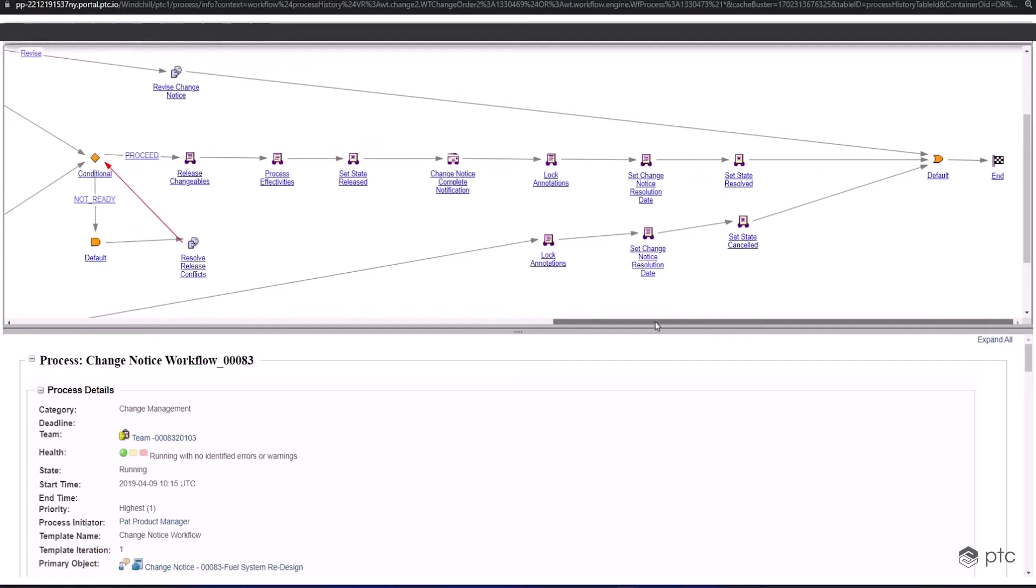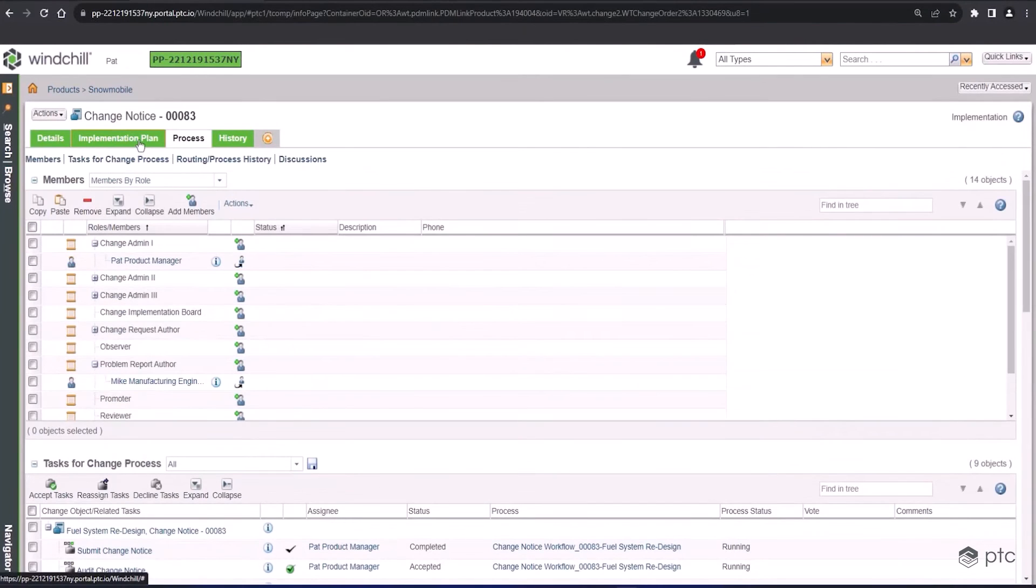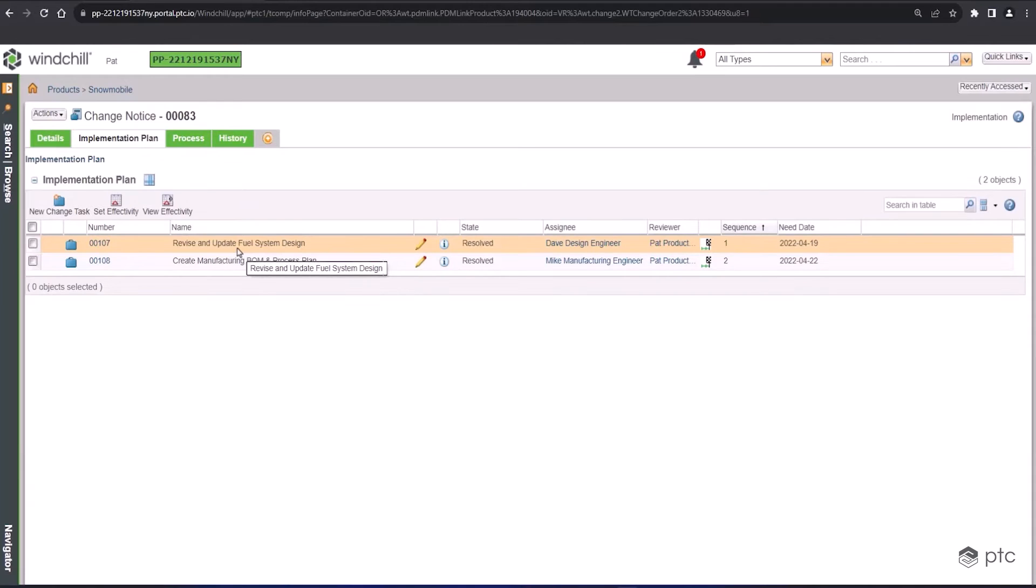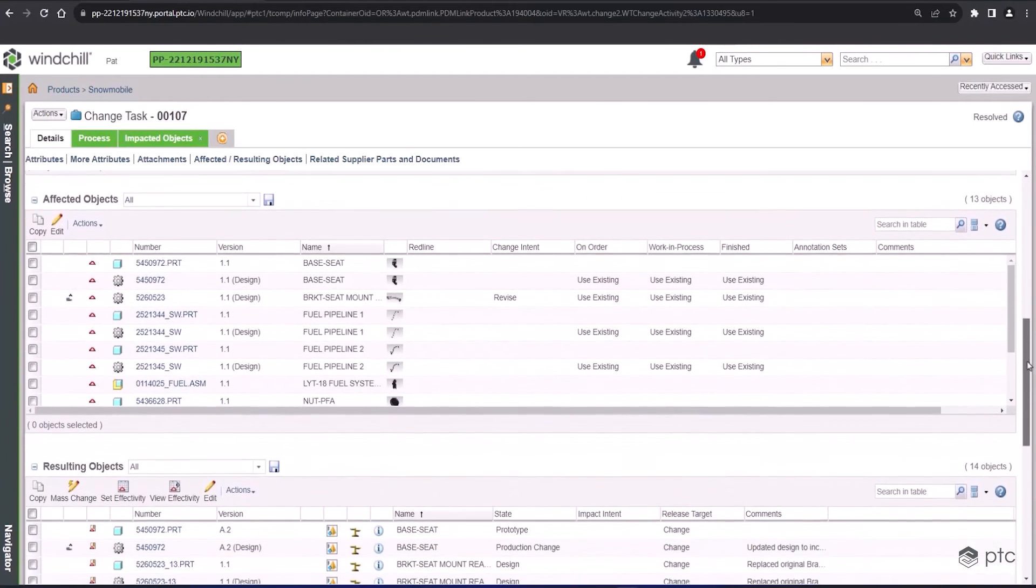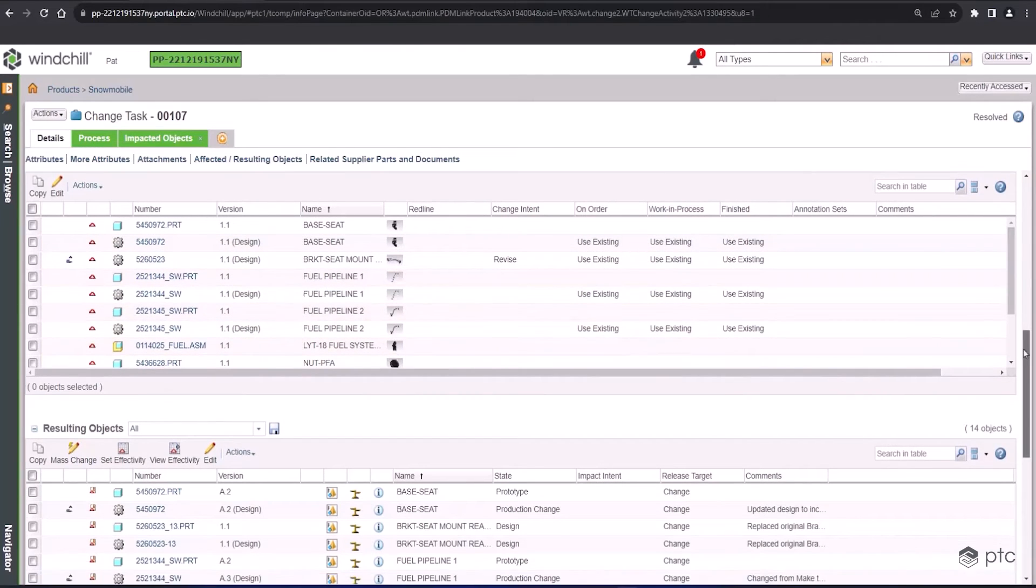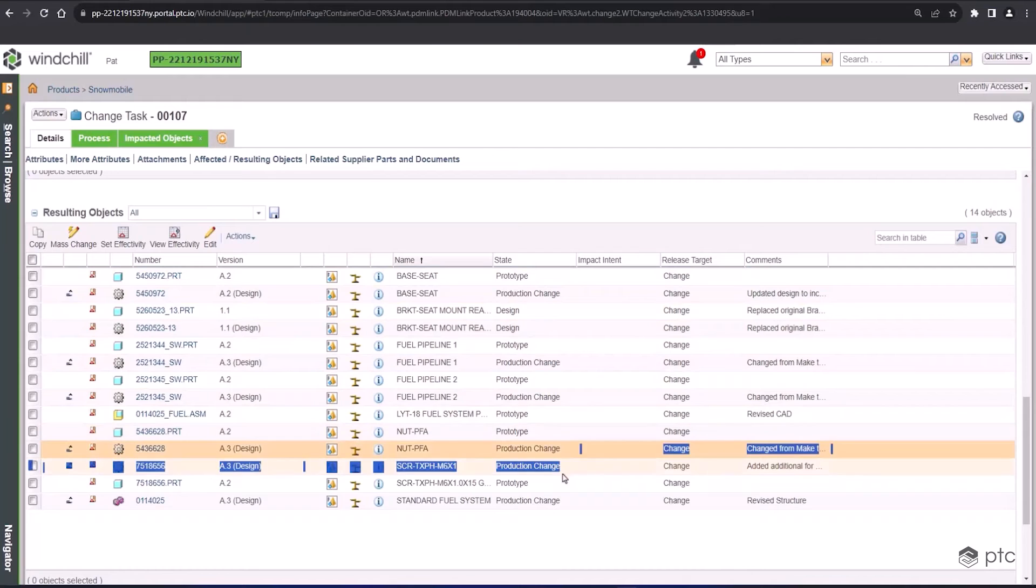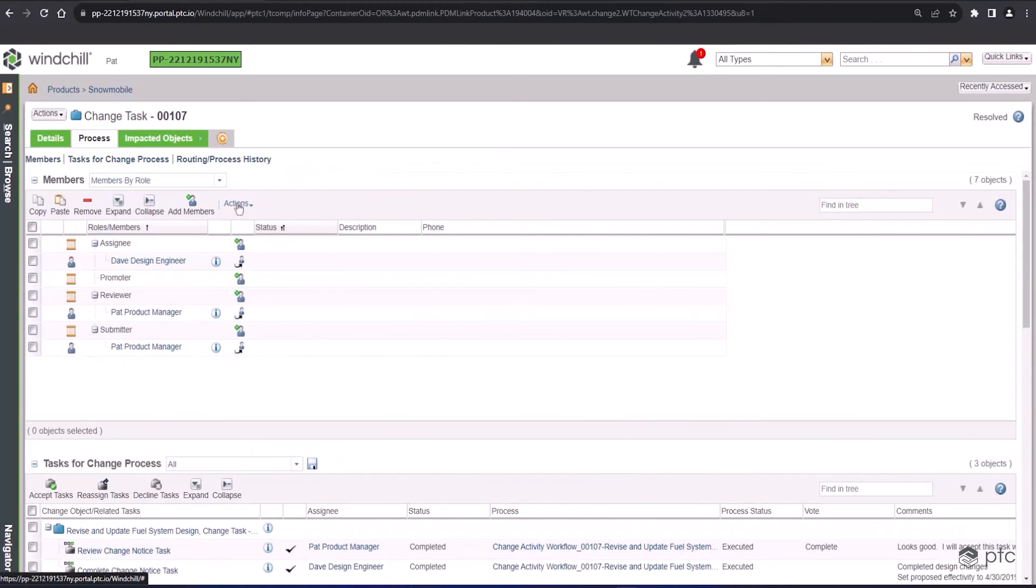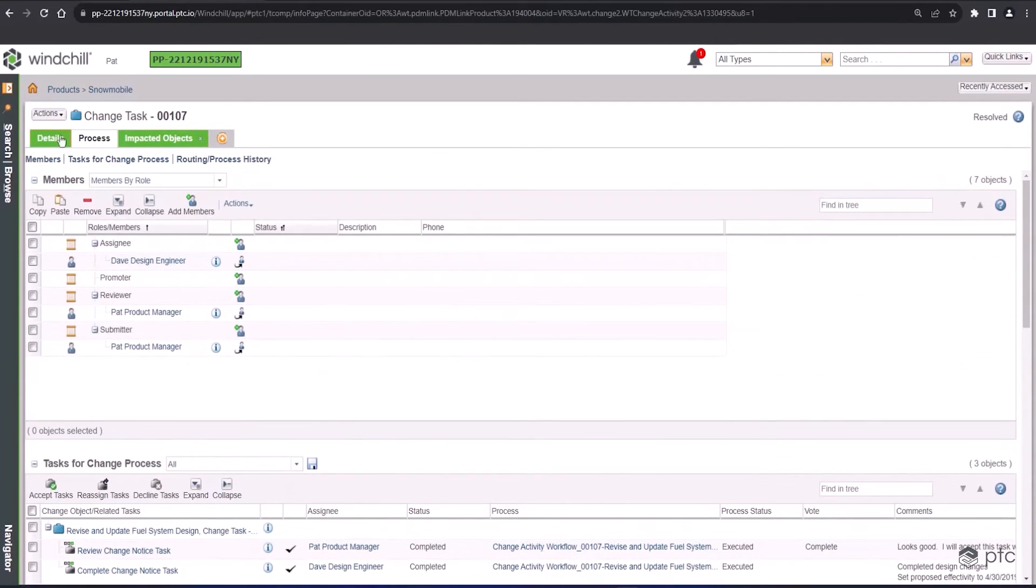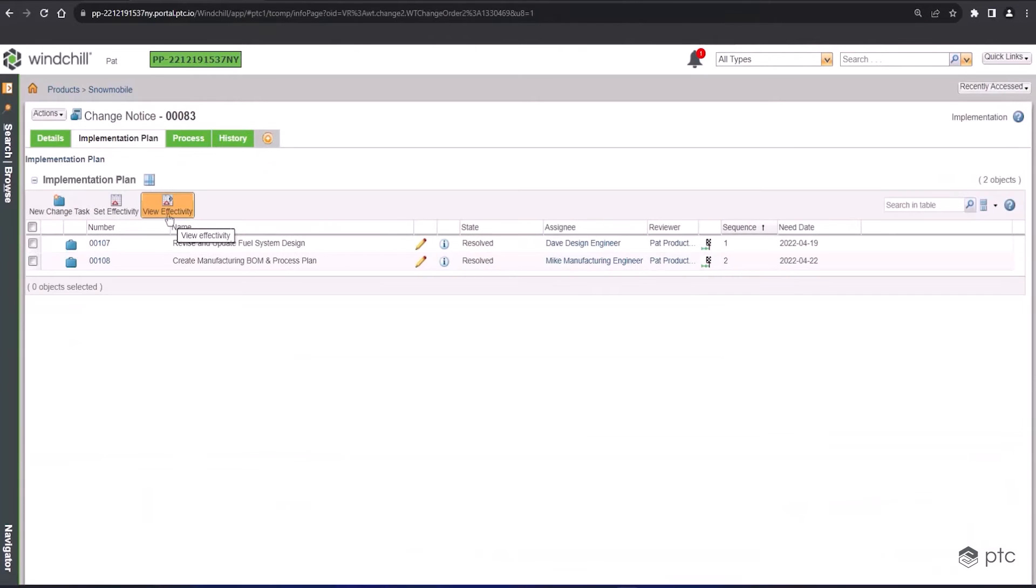And we still have a little bit more work to do. The change itself has been completed, but we're going to have to do our final audit of the change before officially releasing it. To start the audit, we'll look into each one of these tasks and see what Dave, the design engineer, and Mike, the Mech-E, have completed as part of their tasks. Coming to the first change task, here's all the affected objects. They're all in process. The lifecycle state has automatically changed here. They were all released previously, and a lot of them are now in production change. Going into the process, you'll see this is the same information as what we were looking at on the change notice, providing traceability into the change notice and all the tasks that are making up the execution of that change notice.